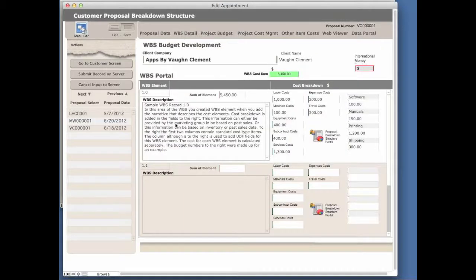In this particular case, there's still tabs on this screen. You would go to the WBS breakdown, where you create like an outline layout. You can use whatever numerics you want to. In this case, it's 1.0. And if you do a 1.1 or a 2.0, each one of these is a separate costing element, meaning that as you do the costing for this at the top level numbers, and there's also some UDF fields over here where you can title them yourself and put in different things. Each one of these would cost up in total by itself. If you did another WBS item, that would be costed up to the total, but they'd be individually set up. So if you had to edit these, you could edit the individual items based on whatever the work breakdown structure described and what work is in the proposal to be done.